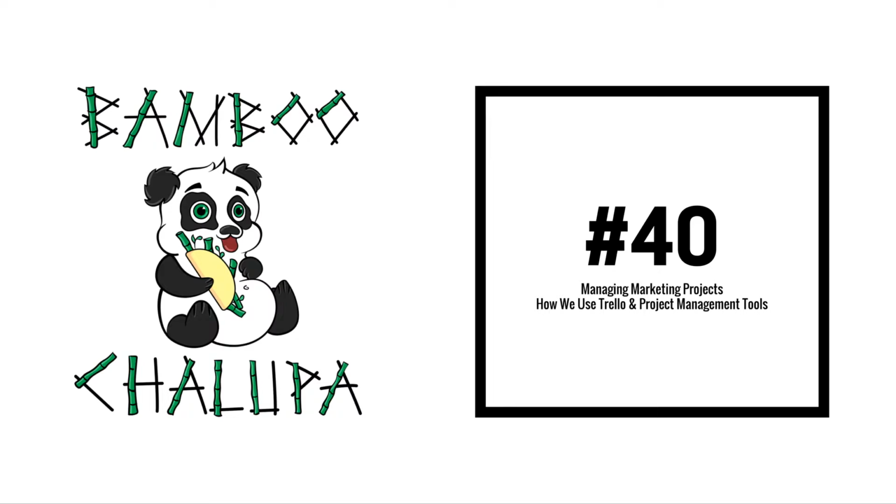And I know with apps like Trello and Basecamp and all the others, they have a system of prerequisites, ways that you can make a project into a series of steps. Because I know that, let's say you want to do a tech audit. Well, before you can do a tech audit, you have to have access to the back end of the site. You have to have access to webmaster tools.